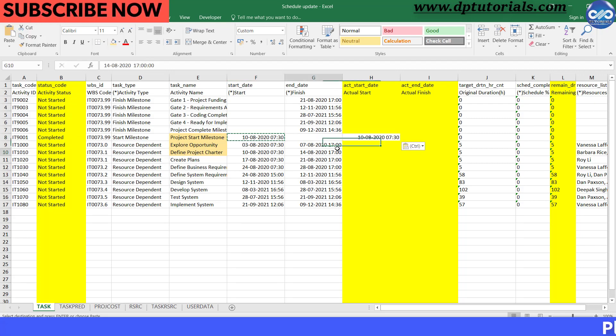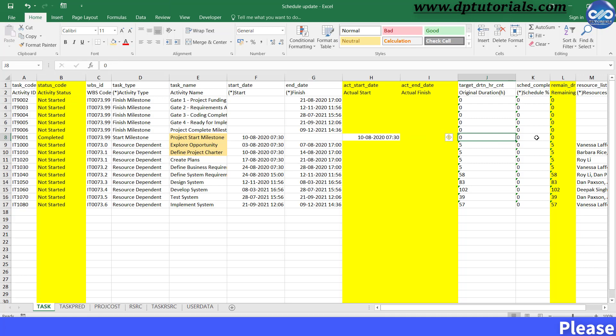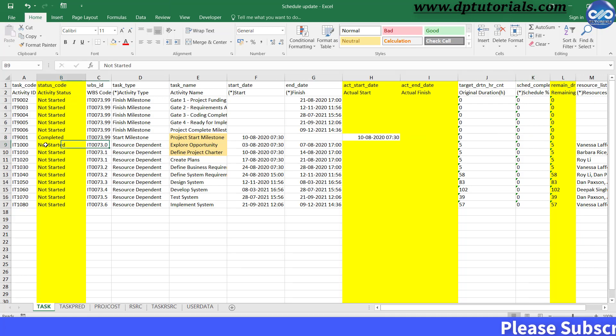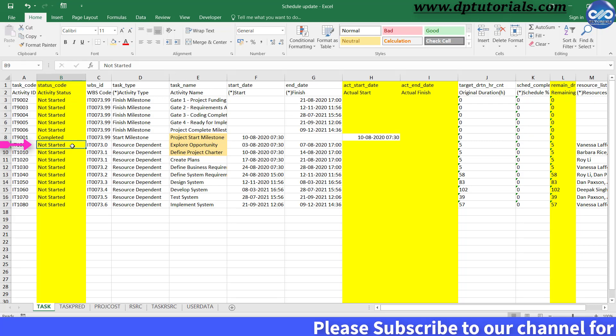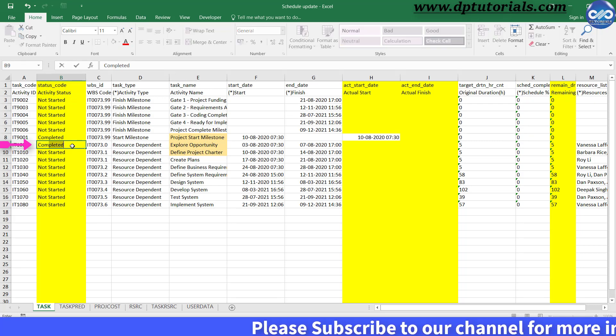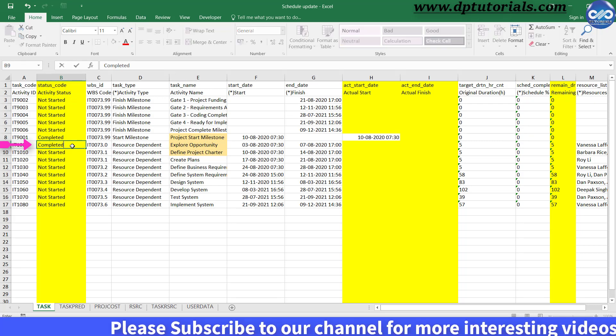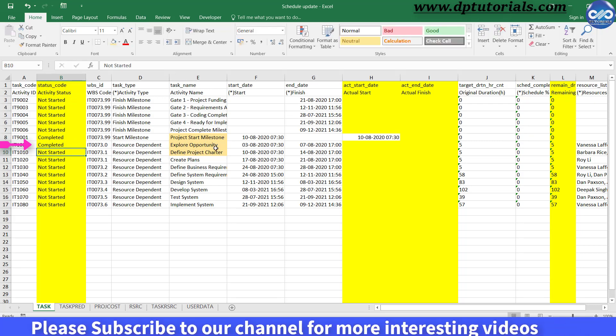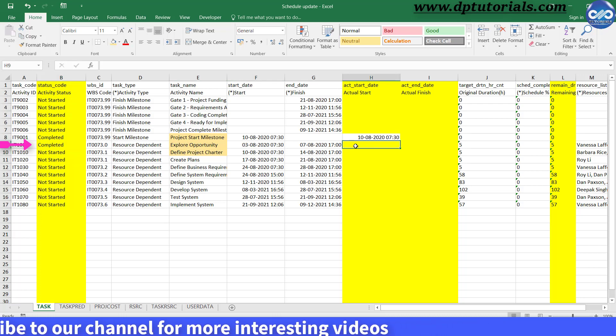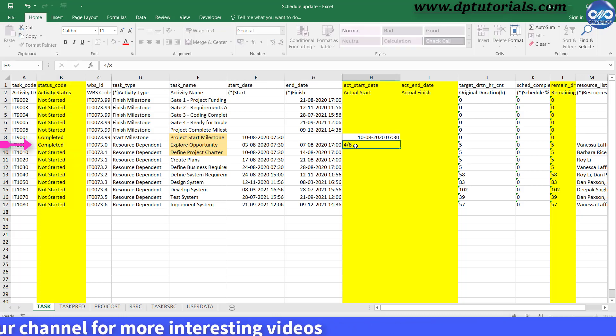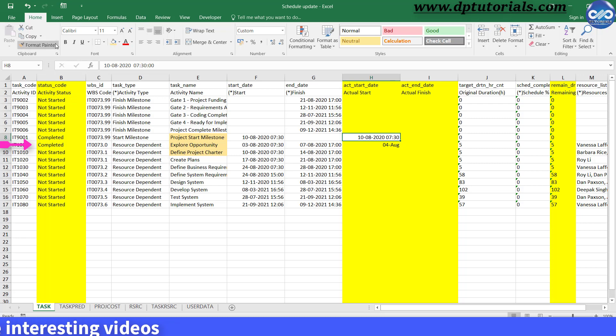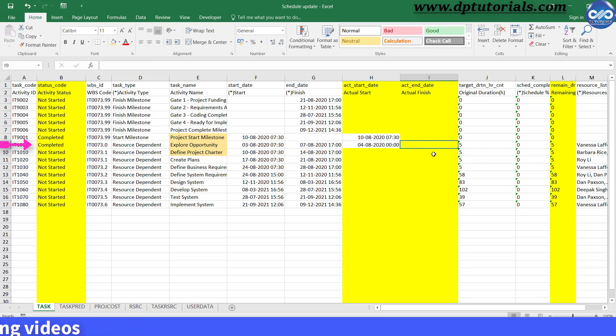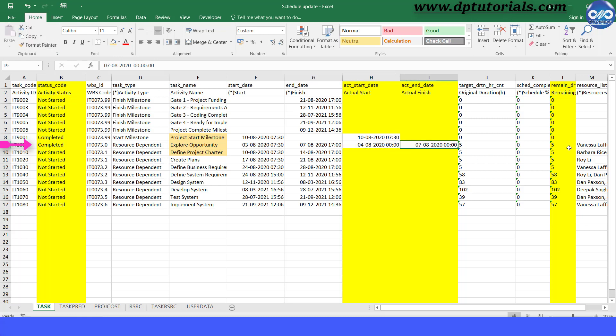Then for the second activity, Explore Opportunity activity, enter the Activity Status as Completed, Actual Start as 4th August, Actual Finish as 7th August, and the remaining duration as 0.